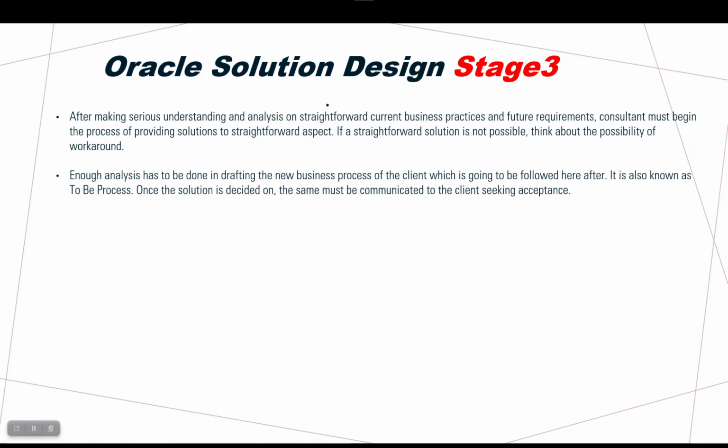You do not work alone. Whatever document you deliver, create, or develop, you have to share it with the requesters, with the client. This is the document of this stage. Is it okay? Why acceptance? To go forward to the next stage. Without acceptance from the clients, you cannot go to the next stage.